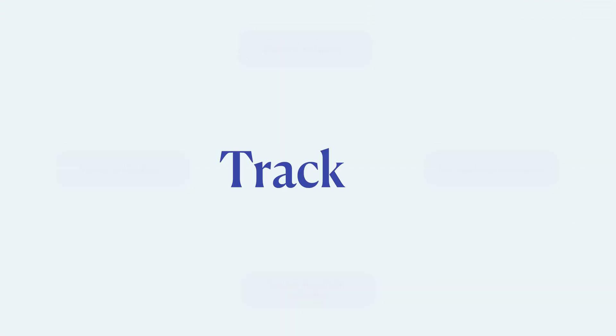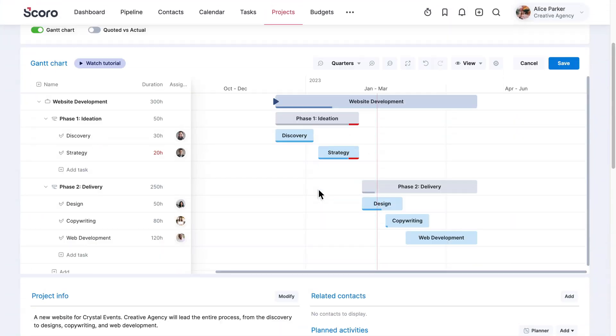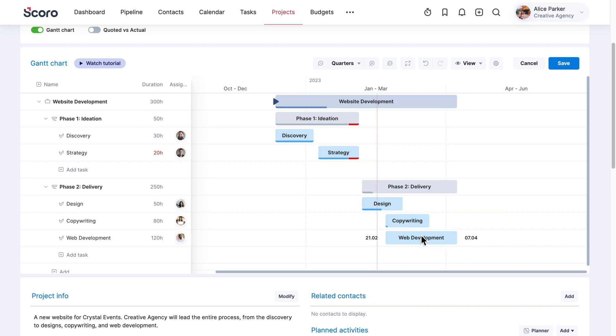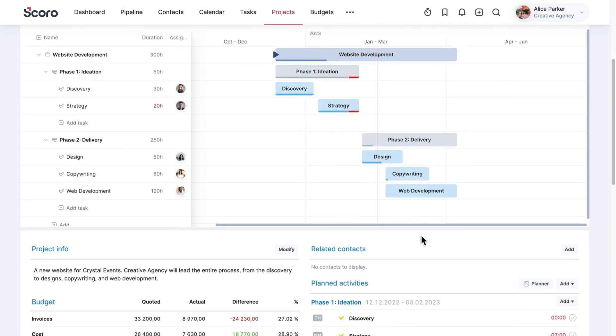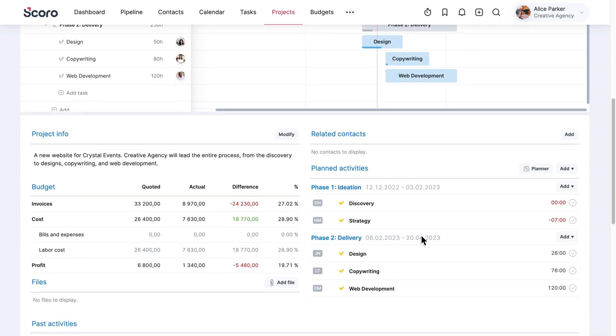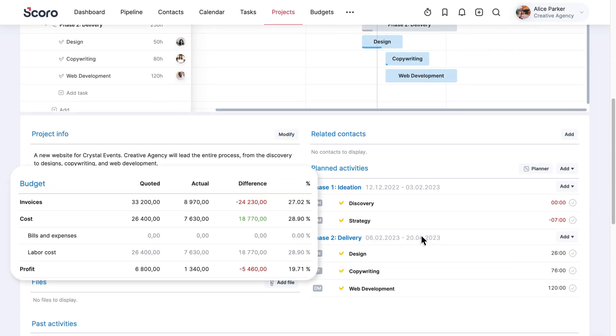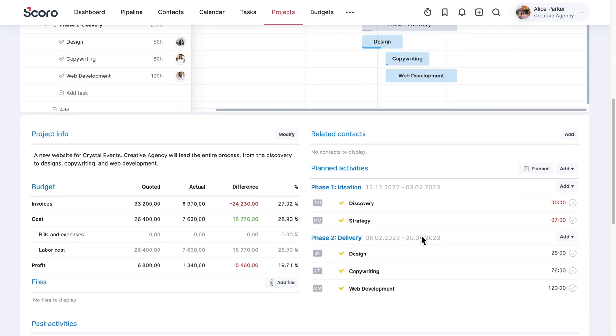Track It. Once your team starts working on the project, use real-time reports to track the progress. The Gantt chart lets you spot discrepancies in the timeline. Use it to adjust project details quickly according to changing expectations. To see if you are staying within the project budget, compare estimated income, cost, and profit with actual results.